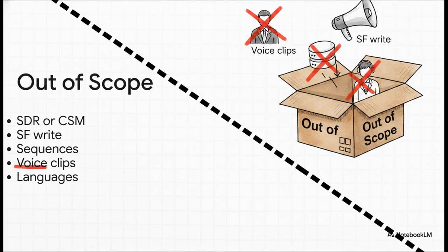But here's the real pro move. She explicitly names what is out of scope, right there in the ticket. She explicitly excludes writebacks to Salesforce or building for SDR and CSM personas. Smart out-of-scopes name the surfaces and paths you intentionally want to avoid, so Chen doesn't accidentally start building the wrong thing and waste a week of sprint time.